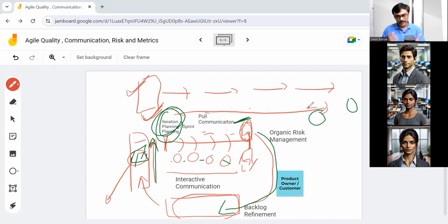Now, what is the next level? As per my organization's standard, I need to understand that, because now it is in the benefit of the organization to do something, since I tried and could not resolve this particular risk. So two suggestions. One is to make sure you do your best and make these risks a visible item in your various status reports, using language which stakeholders can understand. If that is not producing any result and the risk has reached a threshold, then go for escalation. And it's an answer for the PMP exam as well.